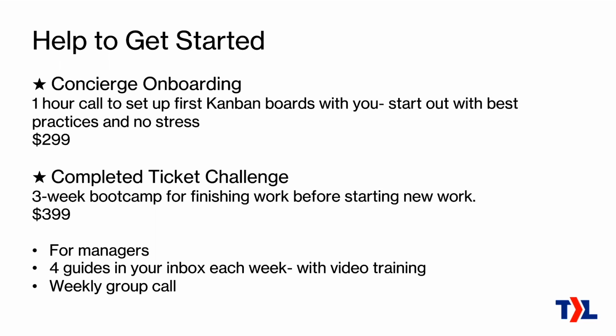Jamie, you said what was interesting for you was push versus pull. Engineers are very pull focused, but I feel I lack control with just the ConnectWise project management module. Yeah, I can definitely understand that. The only way ConnectWise offers to help you with that is by scheduling things into the calendar, which is a lot of work and very fragile, because if anything changes, you have to go and reschedule everything. But Kanban is what gives you control over what your engineers are doing. Your workflow can be that you order the tickets, and the engineers know they go into Kanban and work from the top of the list. You are free to change the ordering of their queue at any time. The engineers don't even need to look past the first one; they're always taken from the first one. So it's totally fine for you to reorder those tickets anytime you want. You have quite a bit of control there.